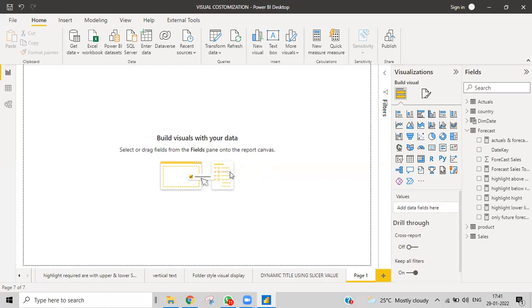And the second one is how many days it took from starting to ending. That is the second measure that you need to calculate for each and every project. After that, take projects in the axis, and take these two values in the legend, and obviously you'll get that Gantt chart. Very simple thing, but you need to think a while about how to represent it.